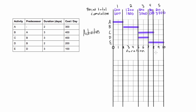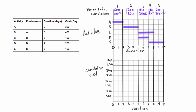Now we'll draw the project S curve for cumulative costs. Make sure the axes match the Gantt chart above, with this axis tracking cost in dollars. We already know the cumulative costs for each period — the sum at the end of the last period is the whole project cost. We start at zero dollars and plot the cumulative cost at the end of each period.